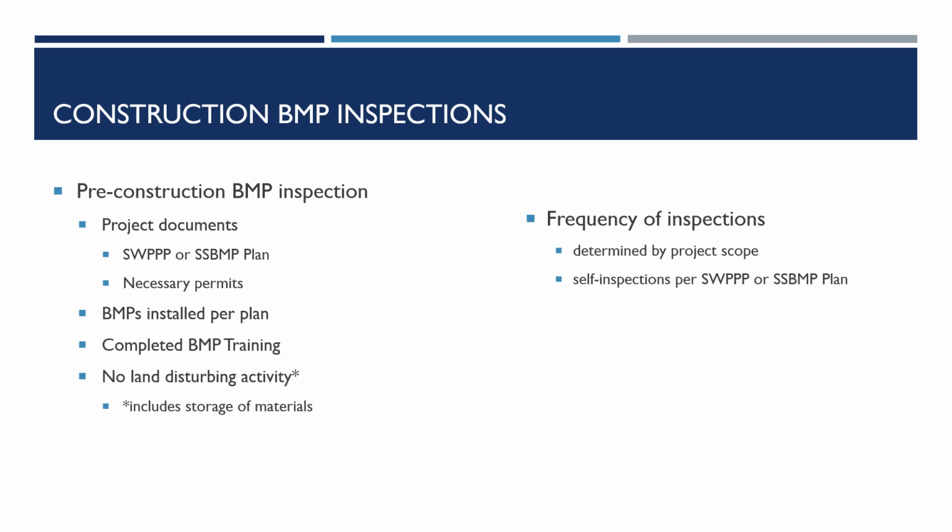Throughout the life of the project, the team must conduct self-inspections of the construction site and on-site BMPs as outlined in the SWIP or SSBMP plan. Typically, these inspections are conducted weekly.